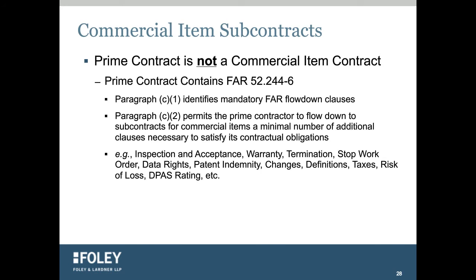So we as subcontractors get it. We understand that, but that doesn't mean, prime contractor, that I need to accept a termination for convenience that's not government-directed. So if it's government-directed, we'll accept it, but you still can't have the right to terminate us for your own convenience, and so we try to parse that out.